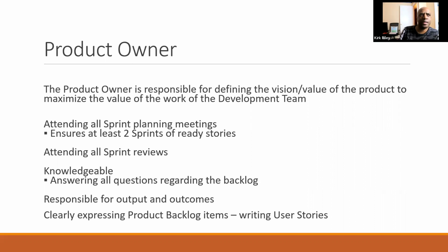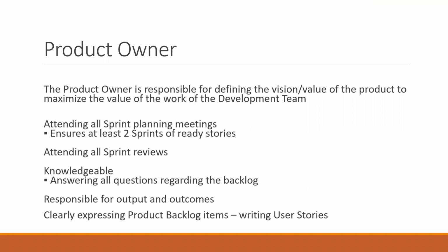That being said, you were asking Victoria about bugs, right? Yeah. And before we move on, just to add to what Lois mentioned as well, it's mainly the burn down chart and not necessarily the burn up chart. And also as Scrum Masters, it's important to reflect on the burn down chart on a daily basis before you even go into your stand up, right? Because that's really going to help you understand what the team is working on and what has happened during that day. It also helps you to know if the team is actually updating their work, right? And also shows that, hey, I'm actually here for you guys.